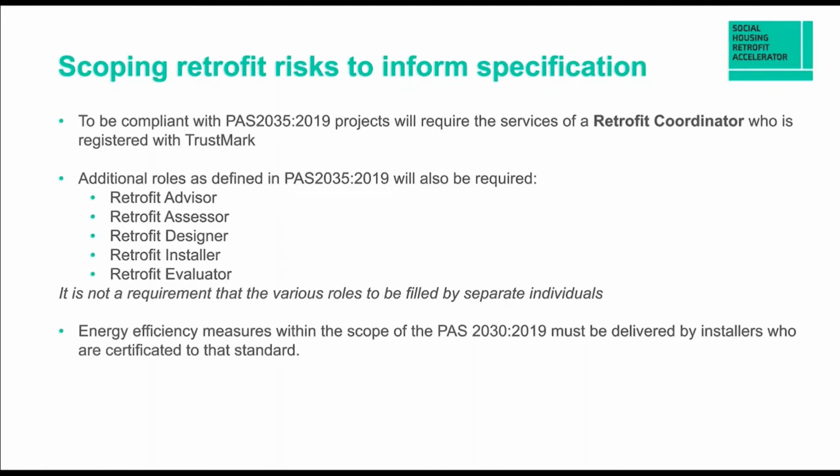That last point at the bottom there: energy efficiency measures must be installed by PAS 2030 accredited installers. As I mentioned before, the accreditation is for particular measures. There isn't one accreditation which covers all measures, as widely different skills are required to install different measures. And it's part of the role of the retrofit coordinator to ensure that each of these installers is accredited and competent in installing that measure.